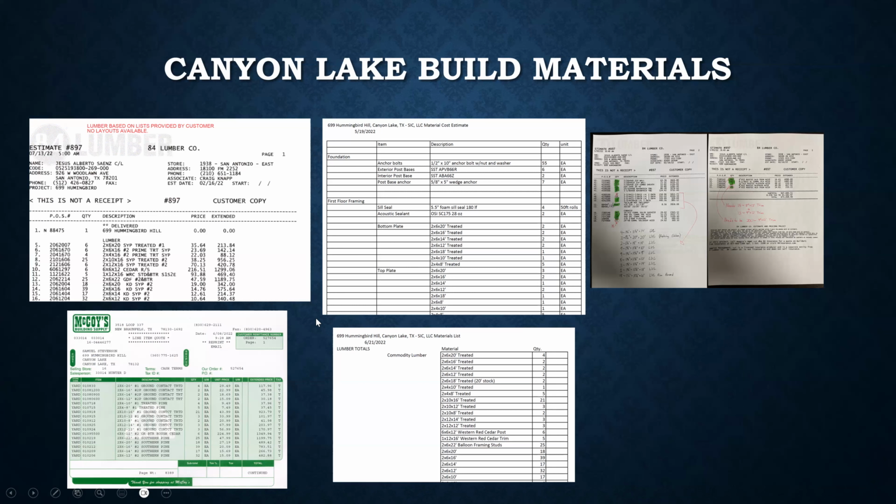And so we asked McCoy's, hey, when can you actually get these things delivered? And they said, 13 to 14 weeks, maybe, basically. And 84 Lumber said, we have it on the yard. So you have to consider all those factors. And we ended up going with 84 Lumber because it was better time spent fixing all their problems and fixing all their lists than getting access to those engineered materials slower. So that was what we chose in that decision.